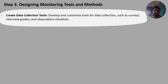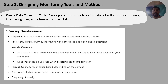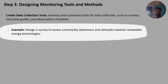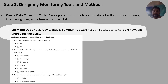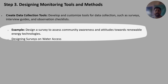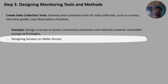Develop and customize data collection tools such as surveys, interview guides, and observation checklists. For the energy project, design a survey to assess community awareness and attitudes towards renewable energy technologies. If you are working in the WASH sector, design surveys on water access.